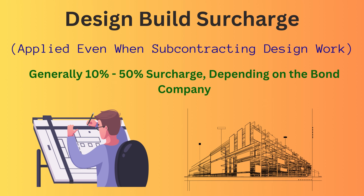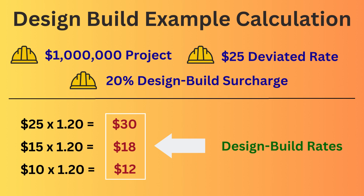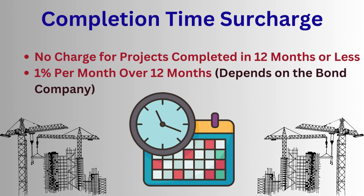Other factors can impact performance and payment bond costs. One of those is design-build projects. Design-build projects carry more risk to contractors and bond companies, even when those risks are subcontracted to a licensed design professional. Bond companies charge more for these risks by surcharging the contractor's normal rate. Depending on the bond company, these surcharges can range from 10% to 50% of the normal bond cost. For example, with a 20% surcharge on a $25 class B deviated rate, the rate becomes $30 (3%) for the first $100,000, $18 (1.8%) for the next $400,000, and $12 (1.2%) for the next $400,000 — you simply multiply the existing bond rate by 1.2 or whatever the surcharge factor is.